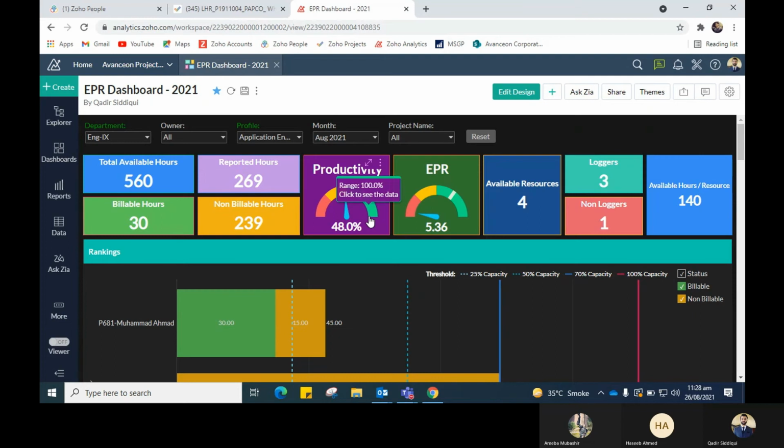The hierarchy is that the project manager creates the project, the team lead creates the milestones and task list, and then the tasks of a project. The project manager is accountable and responsible for all the tasks being accurately updated. Then the team lead assigns the tasks to the team members.